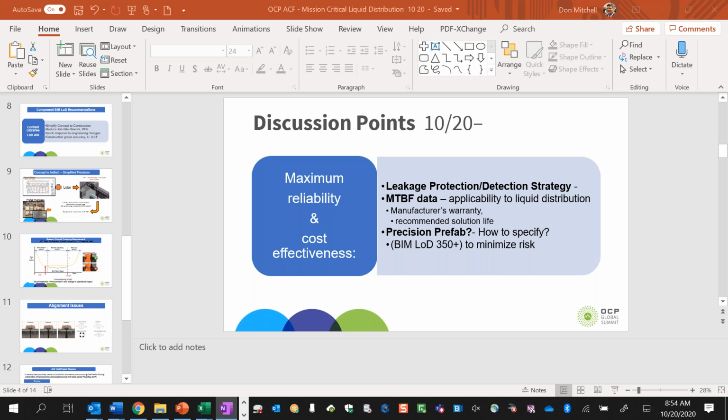There's a lot more I'd like to talk to you about on this, John, but one thing I appreciate in what you're bringing out is, number one, that you did a cost-benefit analysis. You looked at how much it is worth putting a diaper on something versus what the damage is going to cost. And obviously, for people who lease data center space, their SLA may give some dictation here, and trying to give them some guidance is where we're going. Let's go back to those valves.